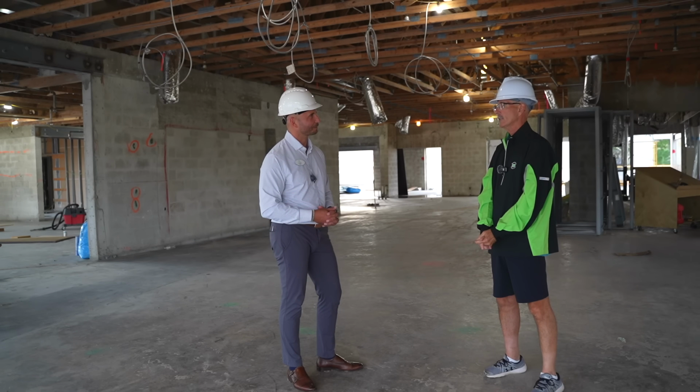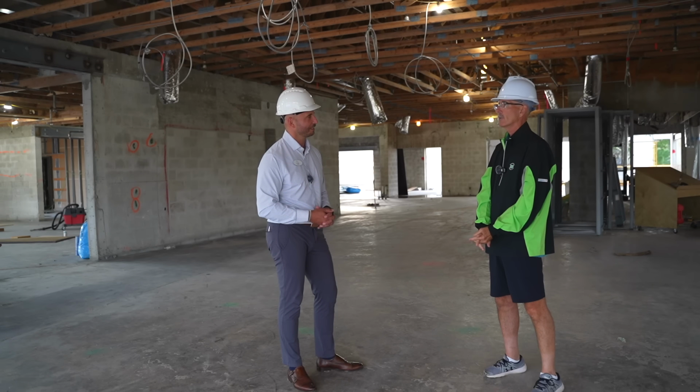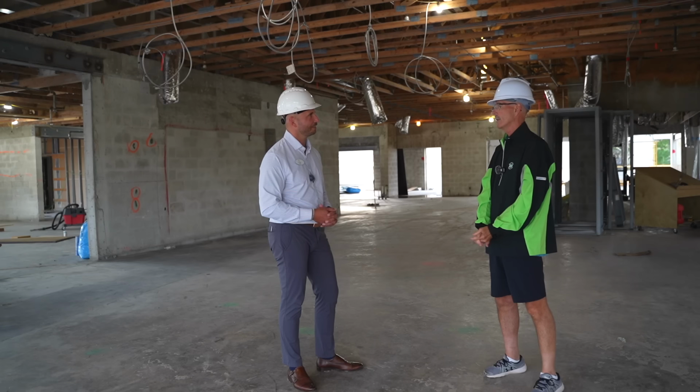We're waiting on trusses. The delivery date now is September 13th. Okay. Which is a Friday, so they'll be erecting on the 16th, Monday.